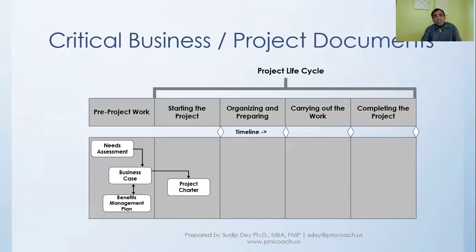Now, this business case will become the precursor to the project charter. Project charter is really the starting point for our project. This is when the project gets kicked off, and as a project manager, we are given the authority to start the project.